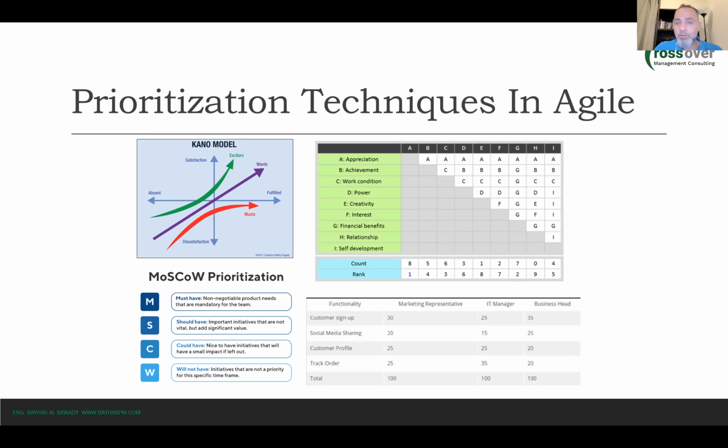And based on those tools, we developed a scope statement, right, that describes in details what is the work to be done, what's the work included in the scope, and what's the work excluded out of the scope, and the detailed constraints and assumptions of the project, right?